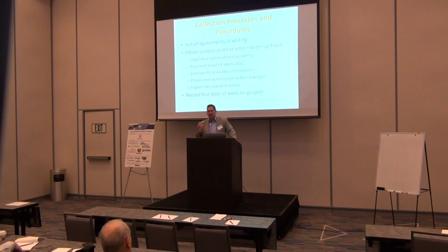And usually in the termination clause, it'll say something like, you have the right to get paid for all work up through the date of termination, which wouldn't include that. That'd be the argument. But that might be something that you try to negotiate. Say, if you terminate me, and what I've done sometimes, and it depends on the contractor, but my feeling is if it's a $1 million contract, let's say, and you get terminated less than 50% done, that's a lot of money you left on the table. So you want some money there.